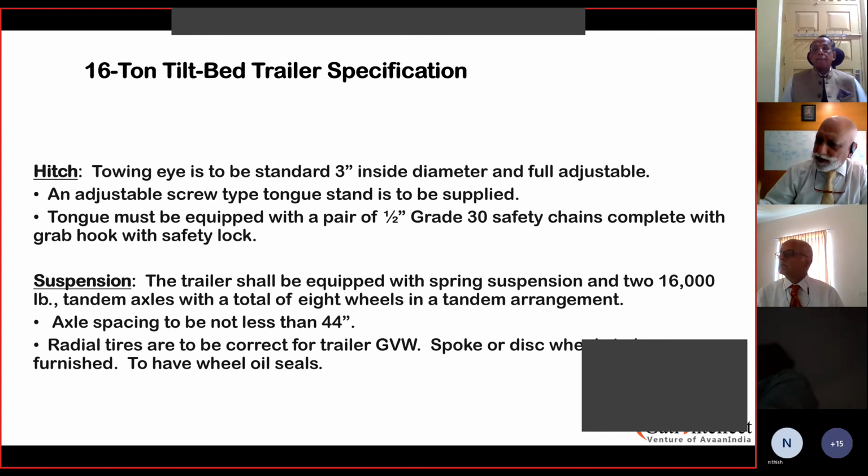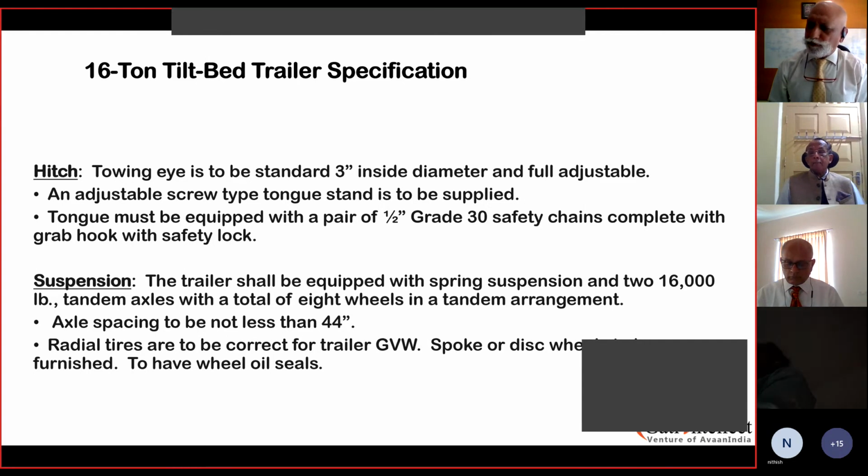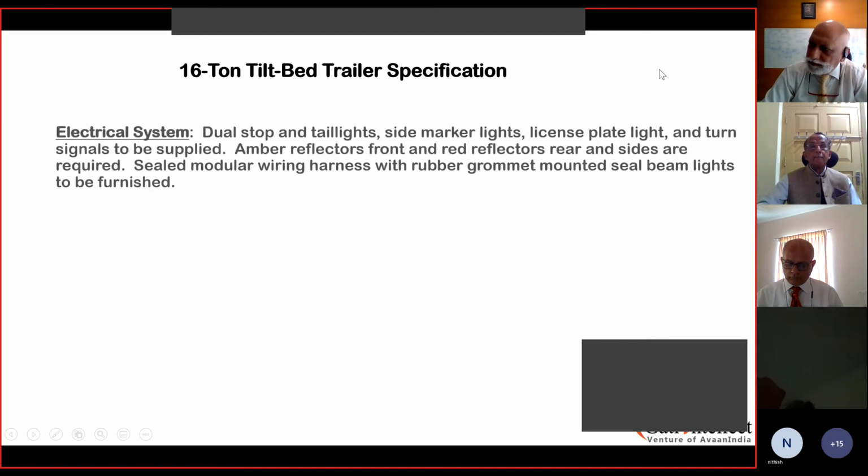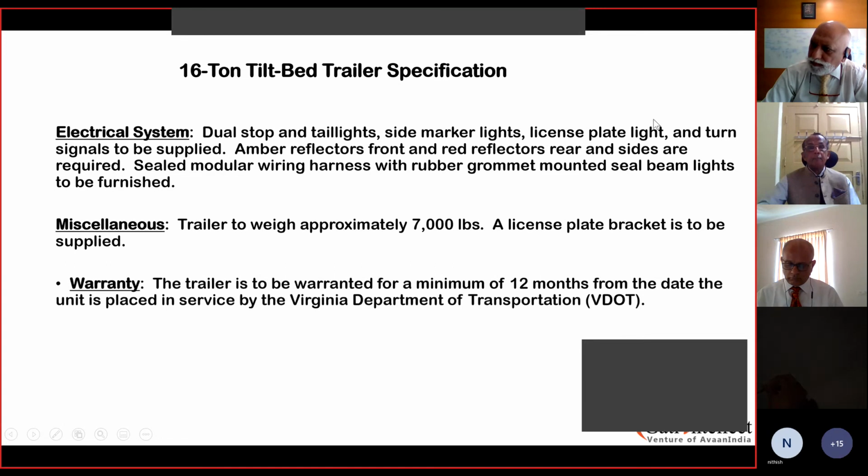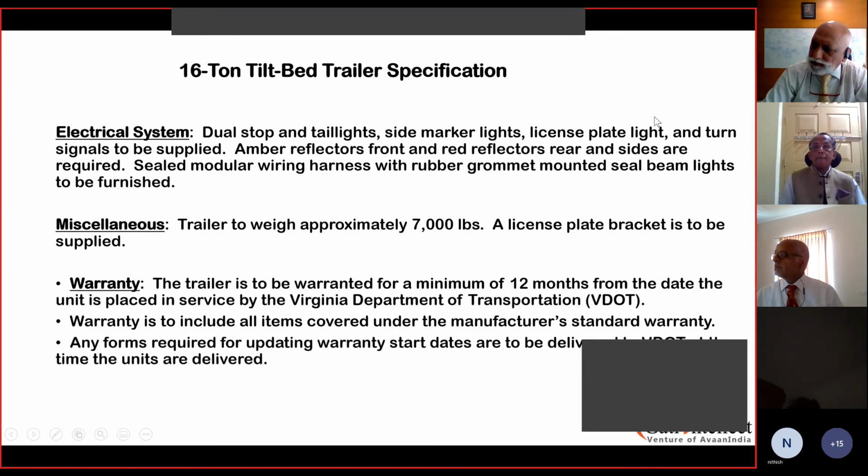All these points are an extension to what I have briefed, that from the technical point of view, right from loading, positioning, lashing, then also the stability of the trailer, the CG of the trailer, the overall load and load stability, all those points have to be properly taken care of, which has been well defined in the contract, in the tender requirement. The type of tires, the size of tires, even that is also defined, which will also define how much load the axle can carry. These are all extensions to those safety norms.